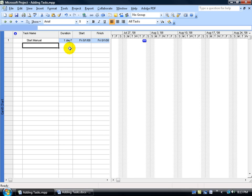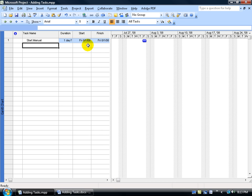Over to the right, we have the duration column, which says one day with a question mark, meaning are you sure that you want it as one day to complete the task. Then we have our start and finish dates. Now remember, in the earlier training video, we said our project is going to start on August 1st. Well, when you start a task, it assumes that you're going to start on the date that you said you want to start the project on.